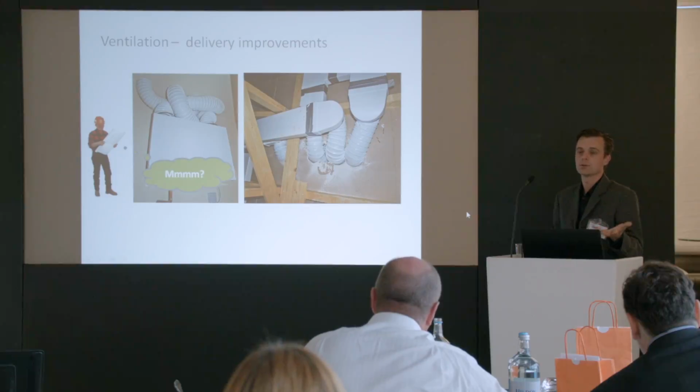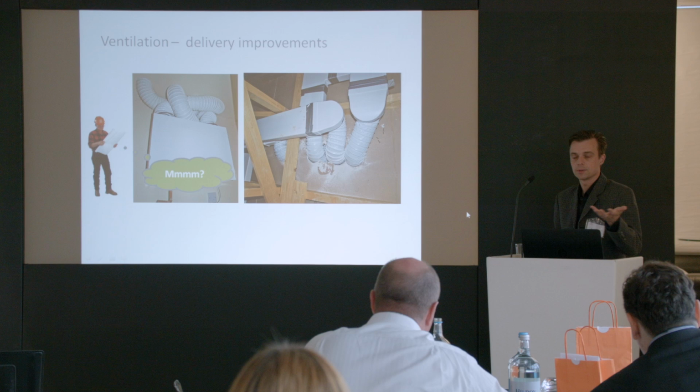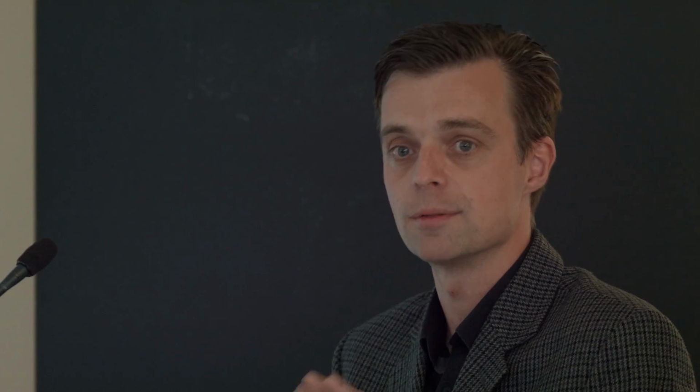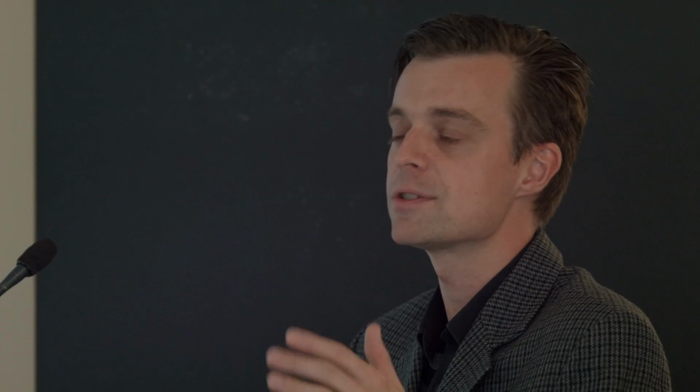But what we're doing is using those site audits, walkthroughs, for want of a better description, to feed back to the developer. So the first developer we worked with in the southeast, within 2 weeks had all of their regional procurement directors and site managers in a room with their ventilation supplier, getting some cold steel, as Rob Pannell, my managing director, would say, saying this is what's going wrong on site and this is why it's going wrong with procurement, and they've changed the way they worked. So we're doing that on a number of sites, and we'll turn it into the equivalent of that builder's book, but for ventilation and building services, so that it demystifies many of the areas where there are problems.